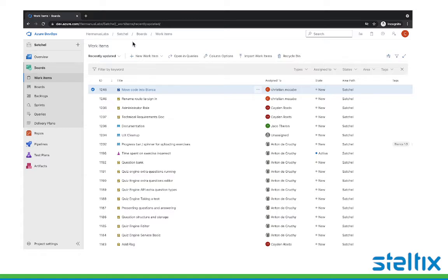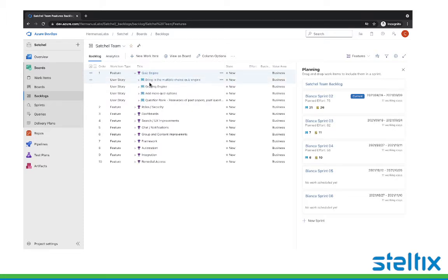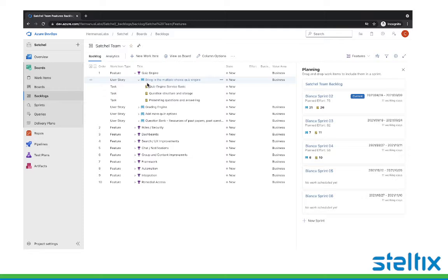We, in this project, are set up for sprints, so we fill everything into the backlog that needs to get done, and the backlog is immediately filtered by feature. And you'll see here that under each feature, we also have a set of user stories, and then under the user stories we have tasks. And like I referenced in another video, I can come off of any of these and begin to create new branches and start pulling that branch locally, make the changes and push it back in, and then that would close off this task. So you can really set this up to automate those reports.